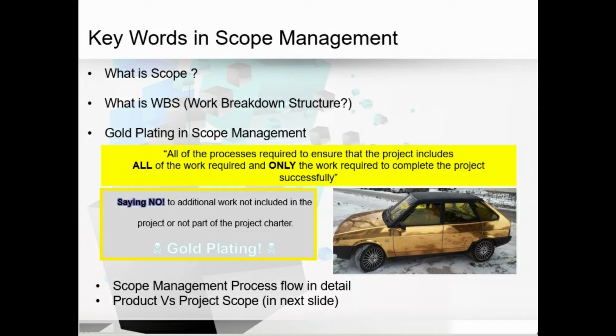Coming to the WBS, that is work breakdown structure, this tool enables you to clarify and identify scope as well as find the additional scope. In this, the requirements must be evaluated against the business case, ranked and prioritized to determine what is in and what is out of the scope.